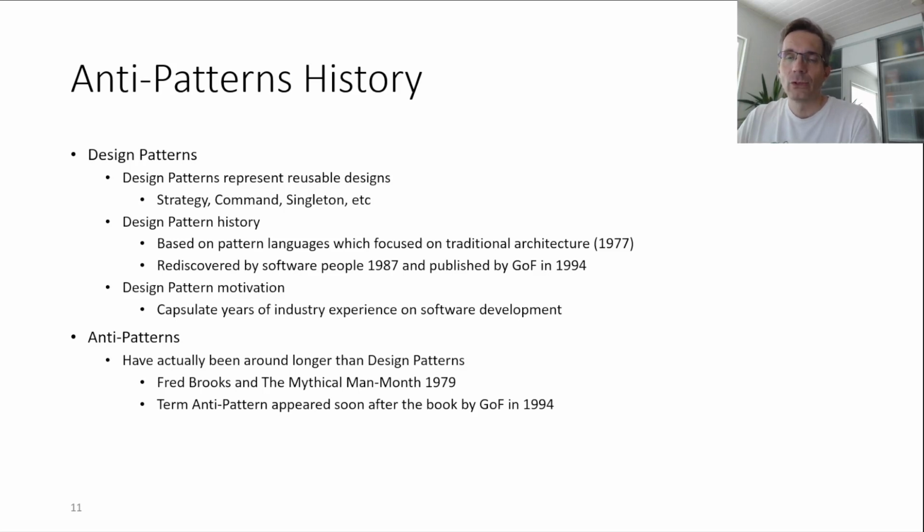1979 can be considered an anti-pattern. What the Mythical Man-Month means is that not all man-months, or I guess currently we should say person-months, are equal. If your software project is late, you have 5 software developers, and you're already behind schedule, then a traditional manager, not coming from a software engineering background, might think that adding more people to this project, as we are late, would make it complete faster. Fred Brooks pointed out already in 79 that this is not true.